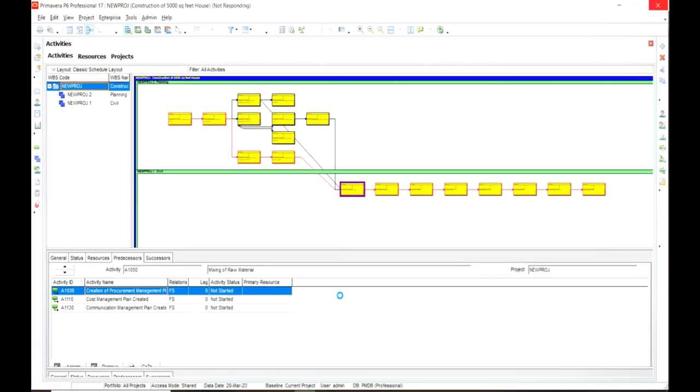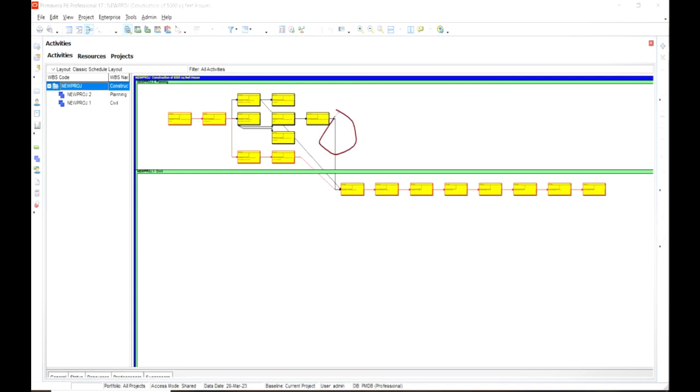So this is the network diagram, and it also gives you the critical path analysis. You can see that some paths are shown in the black lining and other parts are shown with the red lining. So all these paths which are with the black lining, these are not critical path, and this is our critical path. So this is our critical path. All the activities on the critical path are the critical activities.